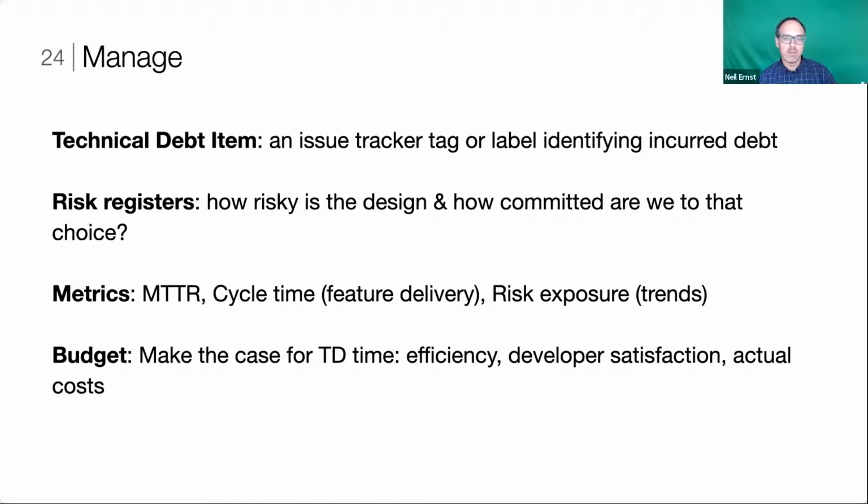When you make design decisions, and hopefully you're capturing these somehow in your documentation, what you can capture there is how risky is the design that we've chosen, right? What is the chance that this particular design approach is going to be subpar for the solution that we're hoping for? So in the risk register, you can capture the fact that the risks to this design choice are really these things here, and we need to come back and revisit that, right? Did this design actually end up working out for us, right? When we chose Tango as the middleware, and we did all these pilot studies, there's still a risk that it ends up not scaling or not being performant enough. And we should come back and revisit that choice later.